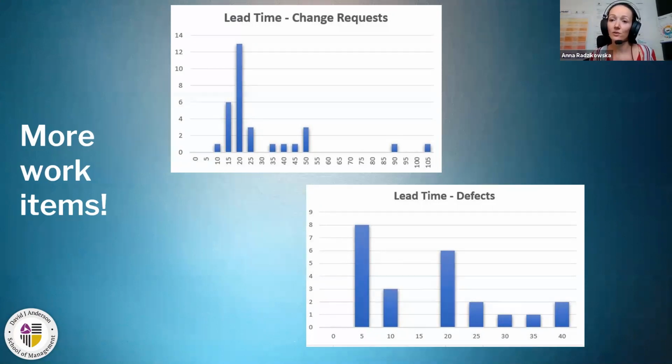And this is the information that you deliver to your stakeholders. So you don't give them the precise date of delivery. You use lead time to tell them when they can expect the delivery and what is the percentage of certainty in delivery, and also what is the level of uncertainty. So the item can always be late.